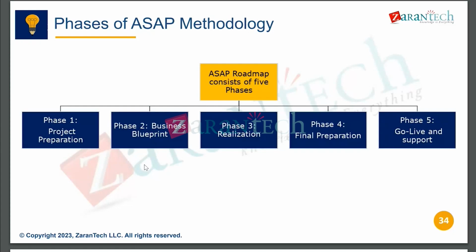So in go live we have two phases: technical go live and business go live. Technical go live is where we will move all the changes, developments, everything into the production system, and we will not release the system to the business. Okay, where the functional consultants or respective SAP consultants will do the cutover activities, right?